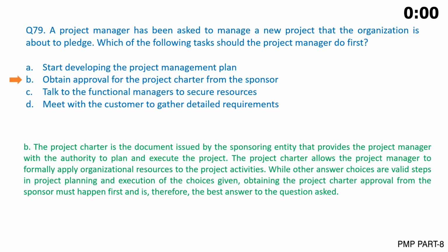The correct answer is B. The project charter is the document issued by the sponsoring entity that provides the project manager with the authority to plan and execute the project. The project charter allows the project manager to formally apply organizational resources to the project activities.